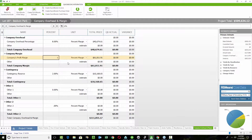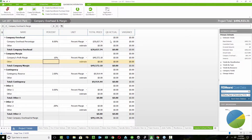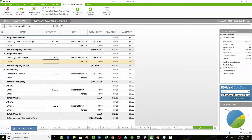If you want to change the profit numbers, adjust them here — increase the profit percentage to maybe 12% to achieve that overall 22% target. You'll notice that when the profit margin percentage goes up, the company overhead dollar amount goes up too, because each dollar amount must maintain its percentage of the larger contract. A common question: does the company overhead margin adjust when you add change orders? The answer is no — company overhead margin is for original contract only and doesn't impact anything other than the base estimate.